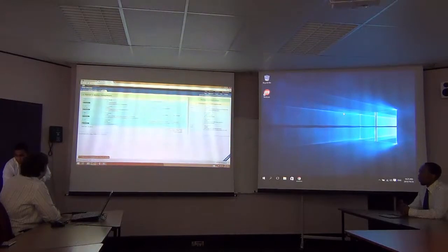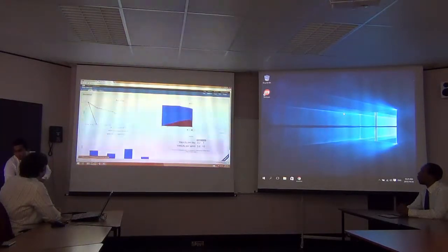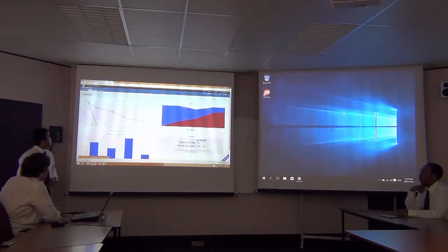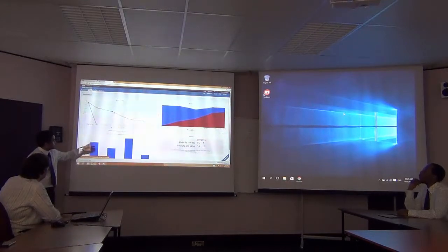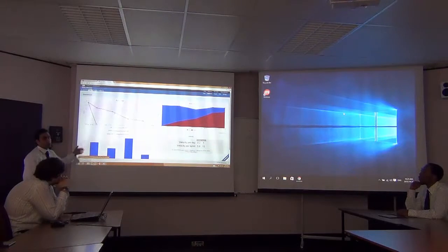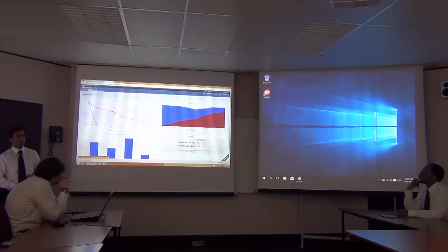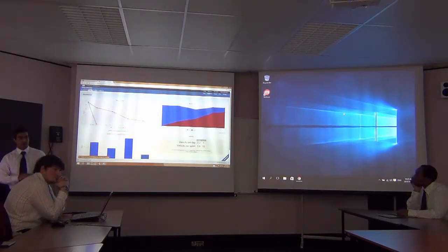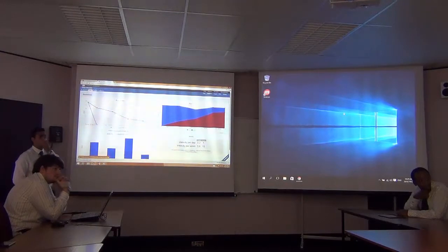And then there's the burn down chart, which Amanda described, which is automatically calculated for you, based on the data that we put and what it completed. And then, as she mentioned, we went up and then went down because we weren't able to actually complete all the things from sprint 1, so we had to do it in sprint 2, which kind of reduced our velocity for sprint 2. Does that clarify?